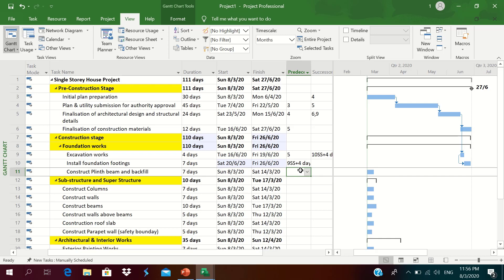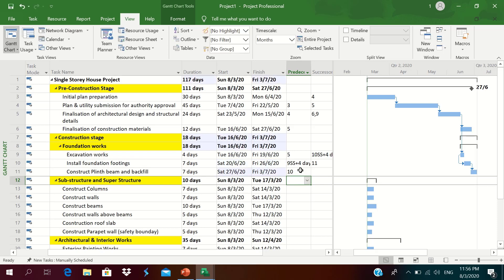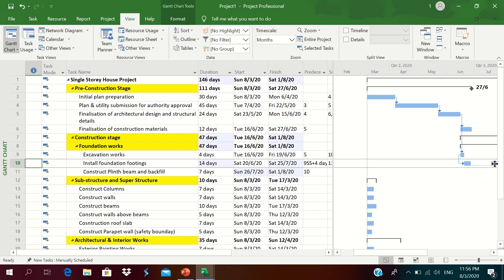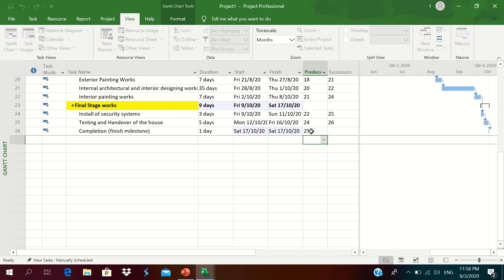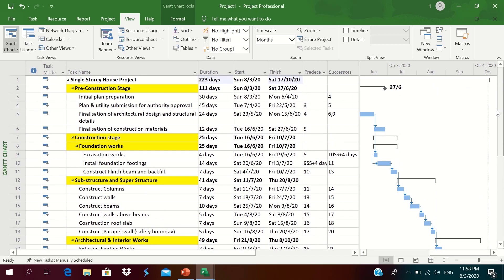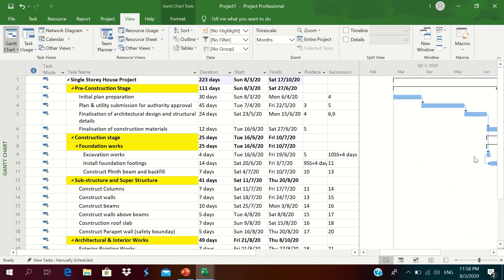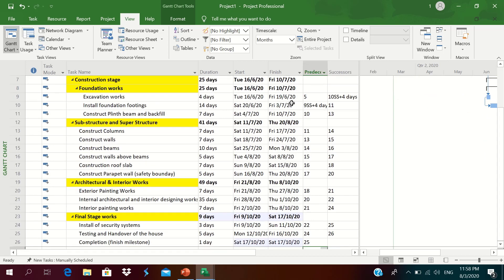Construction of the plinth beam and backfilling starts only after installation of foundation footing, so we enter 10FS. We continue adding all relationships. At the final activity we enter predecessor ID 25 — after testing and handover of the house, the final finish milestone is achieved. We are now done with adding activities, grouping under WBS, adding durations, and linking with predecessor and successor relationships. The Finish-to-Start and Start-to-Start relationships and their impacts are visible.